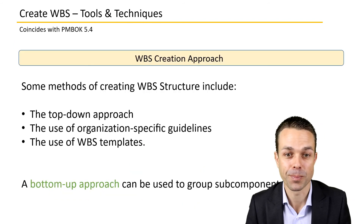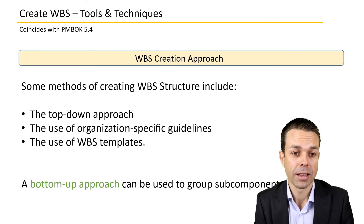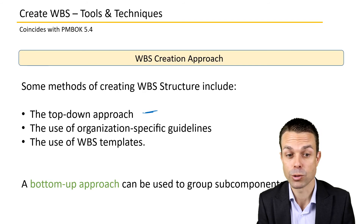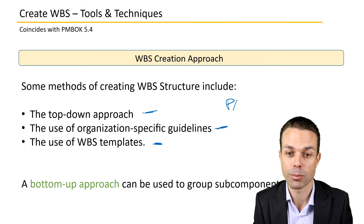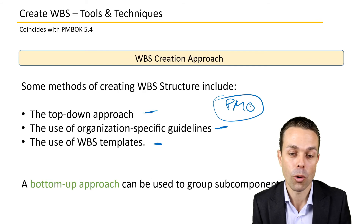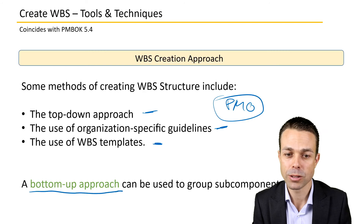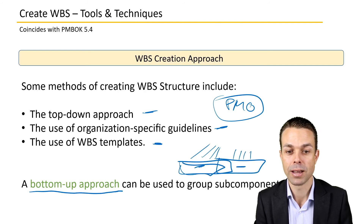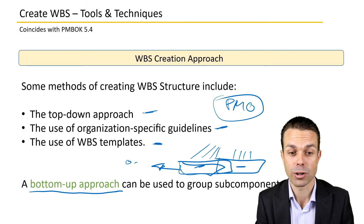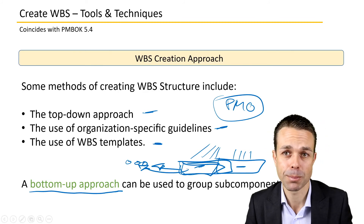Here is an example of a Work Breakdown Structure decomposed down to the work packages themselves — we start with the high-level idea and ultimately end up with something that can be worked on. The WBS creation approach can be done a few different ways: a top-down approach, using WBS templates, organizational-specific guidelines, working with a project management office that has existing guidelines, or a bottom-up approach where you group sub-components to assign them to a particular team.